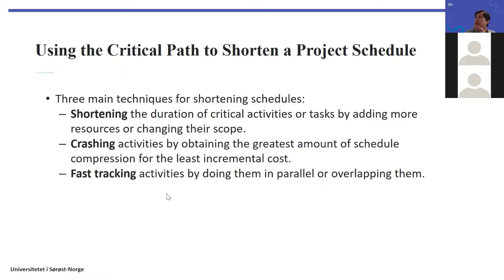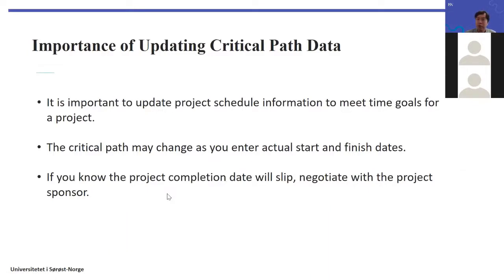There are three main techniques for shortening the schedule, all focusing on the critical path. First, shorten the durations of activities on the critical path by adding more resources or changing their scope. Second, crashing activities — achieving the greatest schedule compression for the least incremental cost. Third, fast-tracking activities by doing them in parallel or overlapping them. Note that while useful in practice, these techniques may make your Gantt chart look messy. You should also update your Gantt chart frequently as well as update the critical path data.